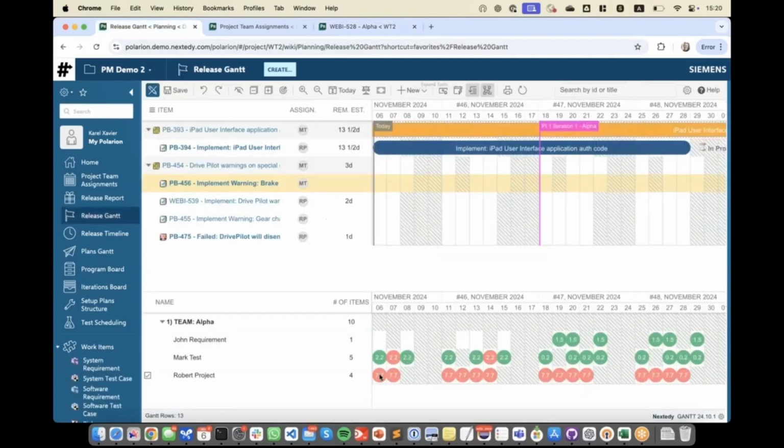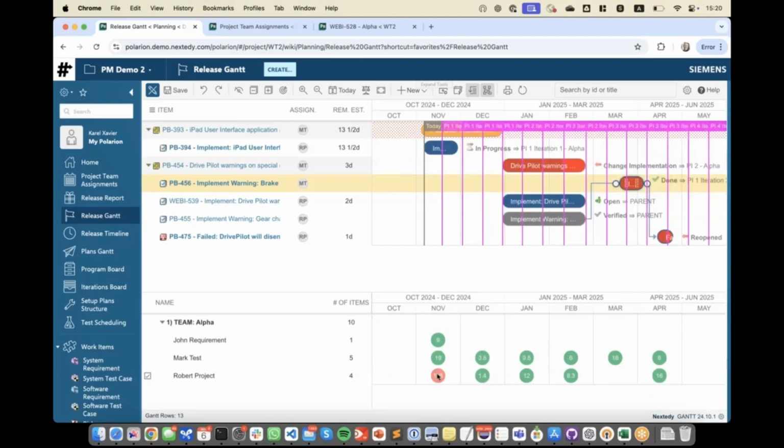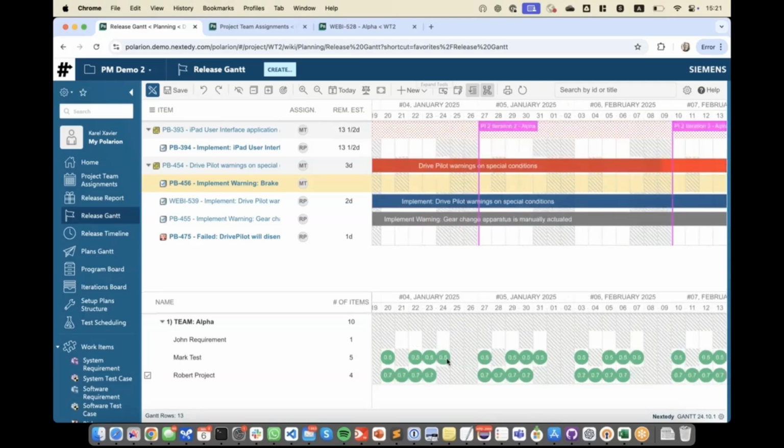That's how we get to this total resource capacity of 3 hours a day, which, if I zoom out, I have nicely aggregated per month. So we see here that overall Robert's capacity per month is 108 hours, but the resource capacity is only 45 hours a month.